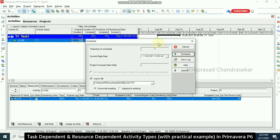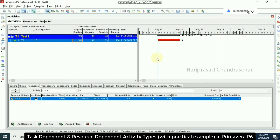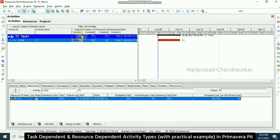Now we go to Schedule and set the start to 7AM. This is a task dependent activity, so the 10-day duration is not going to change, because task dependent activity depends on the task calendar.